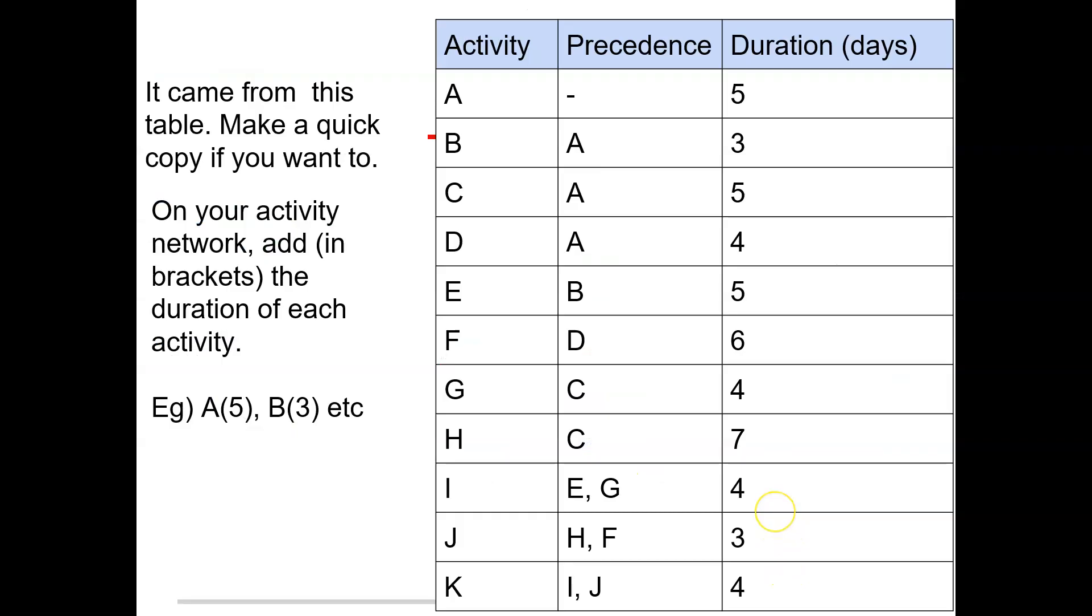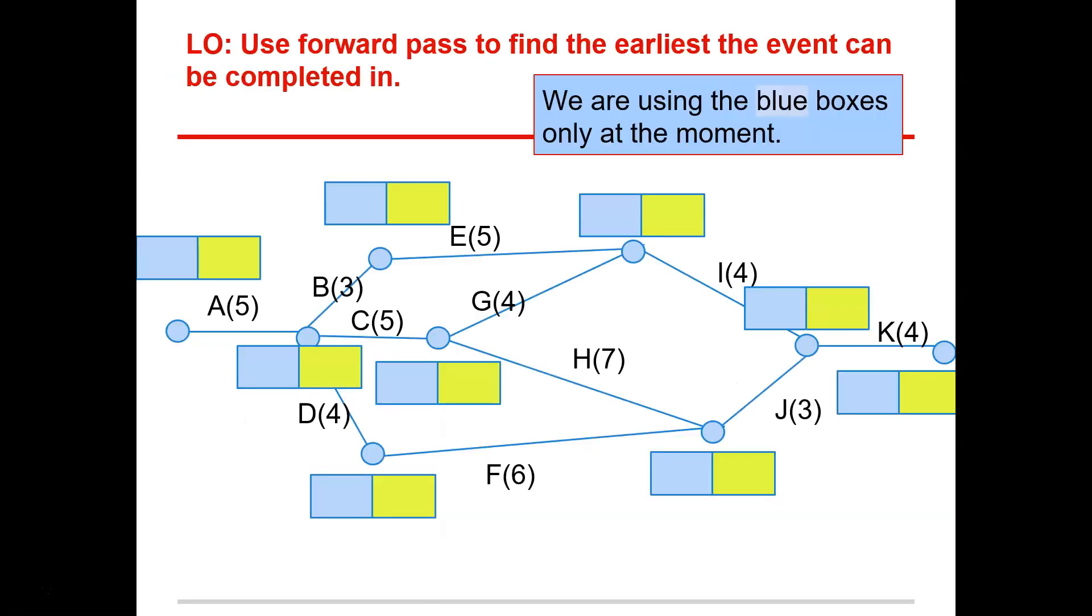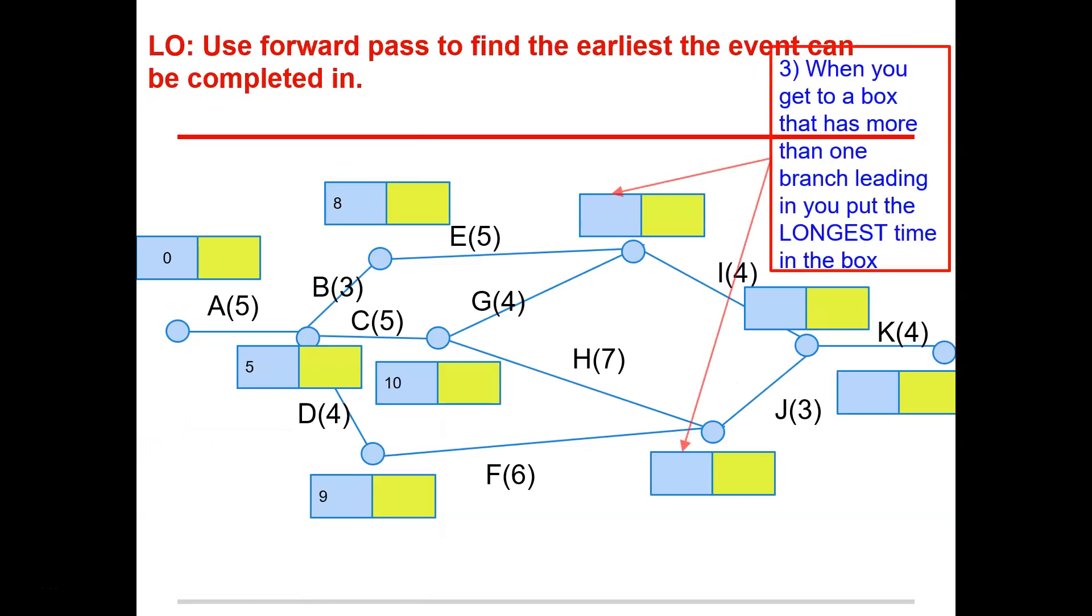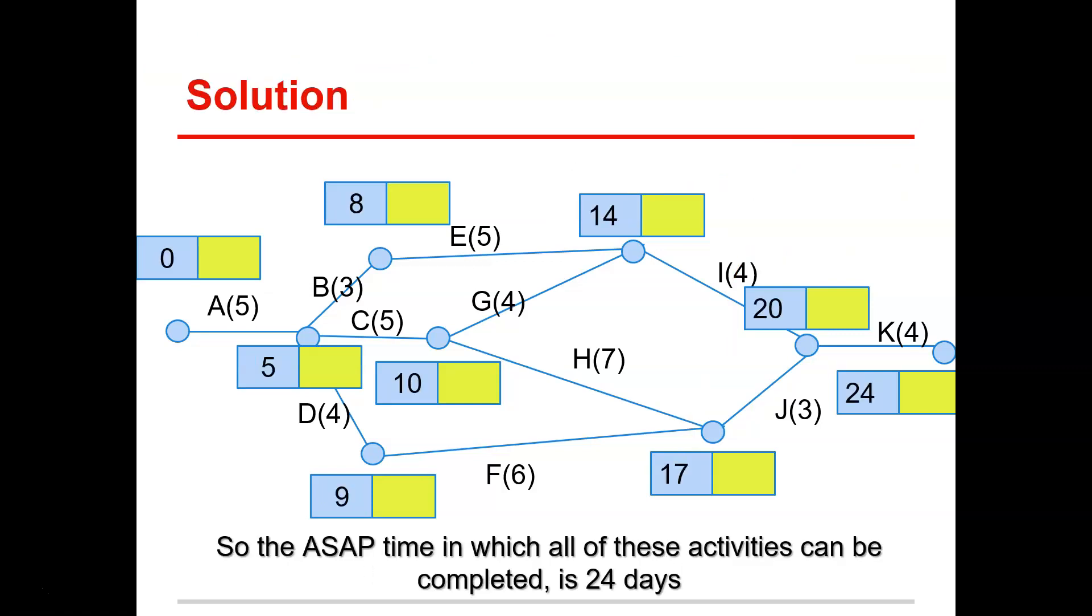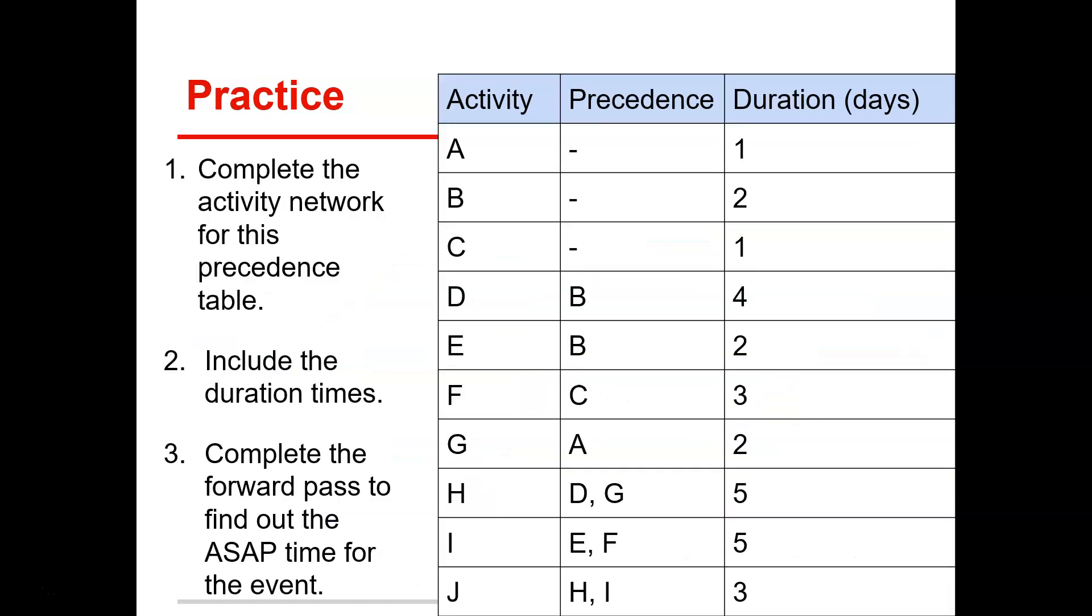But let's have a look at what the answer says. So let's see that we went through and did it correctly. Like I said, when you get to a box that has more than one branch leading to it, you need to put the longest time in the box. I can't stress that enough. It needs to be the longest time. So with that top one, we had 13, 14. So it's 14. With the bottom one, we put 17 in. So the ASAP time in total of this activities can be completed is 24 days. Awesome.